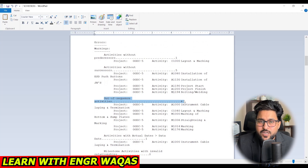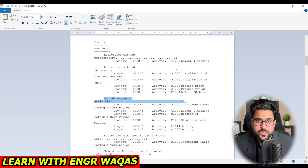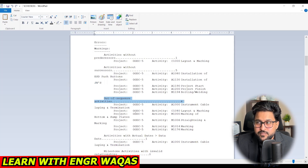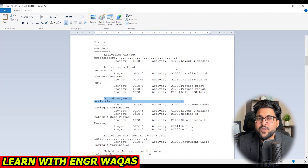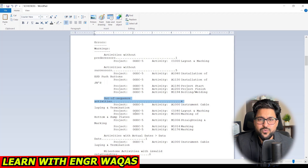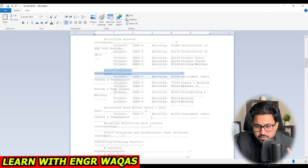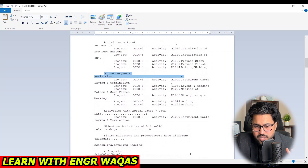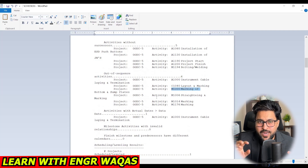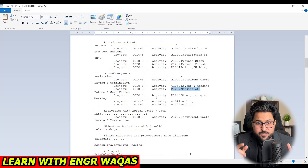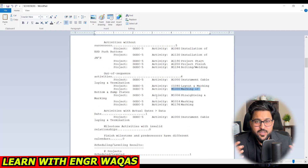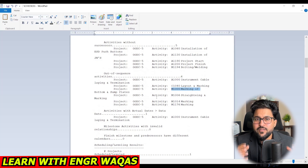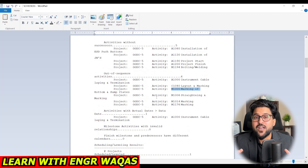In bigger projects you may have 100 or more out-of-sequence activities. The View Log gives you all activity codes and IDs. For smaller counts you can manually fix the relationships. For larger projects with 1000 or 5000 activities and 200 out-of-sequence items, manual fixing is tedious. You can identify each activity from the document — for example, activity ID 1000 'Instrument Cable' is out of sequence — and rearrange relationships based on the four situations explained.